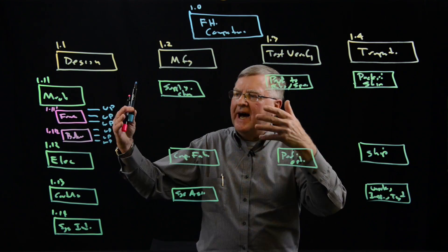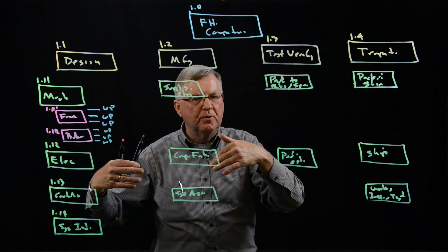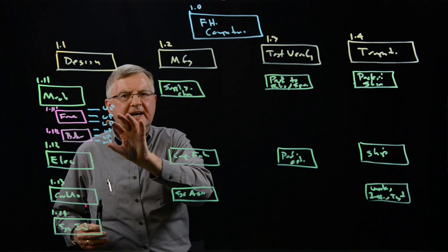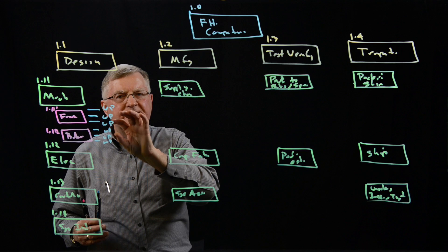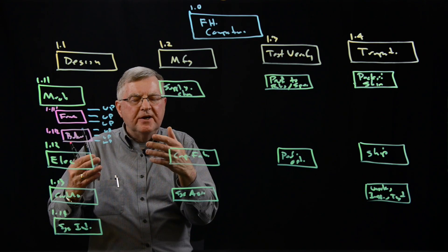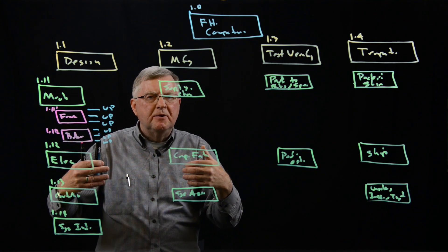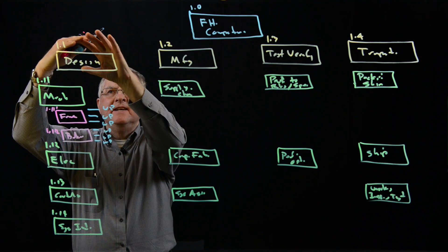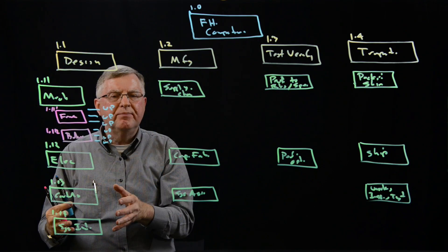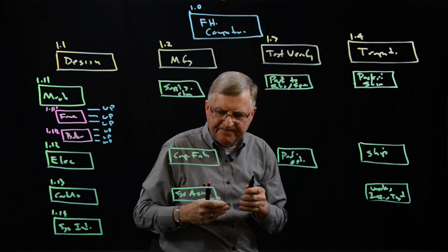Usually we stop at five or six levels of the work breakdown structure, because this gets us to the individual tasks we want to assign. If we need to go beyond six levels, we might consider breaking that portion into a self-contained subproject and managing it as a subproject.